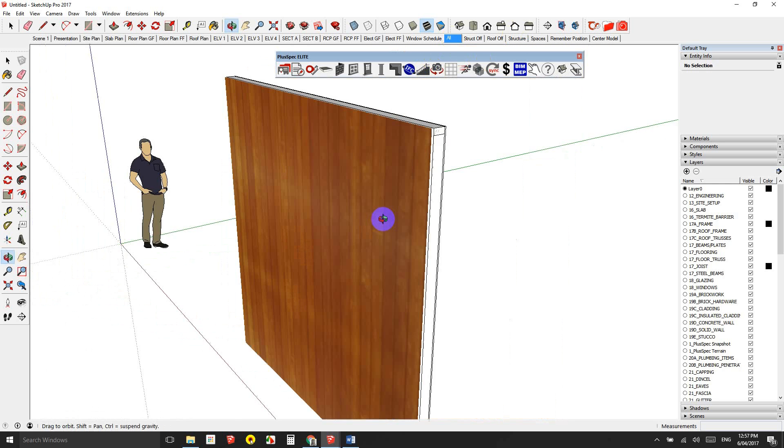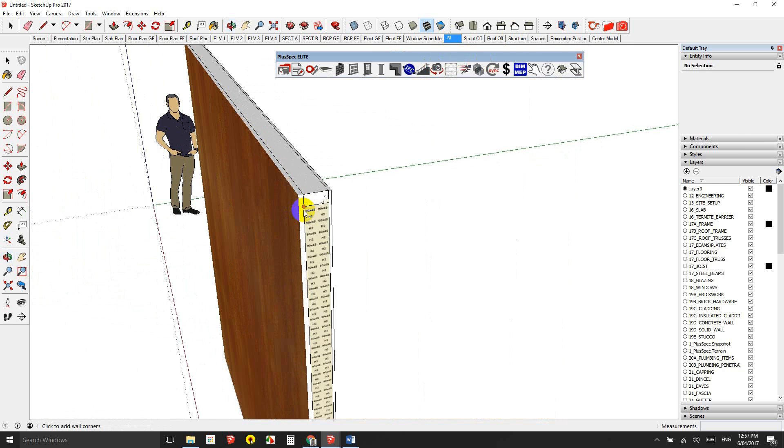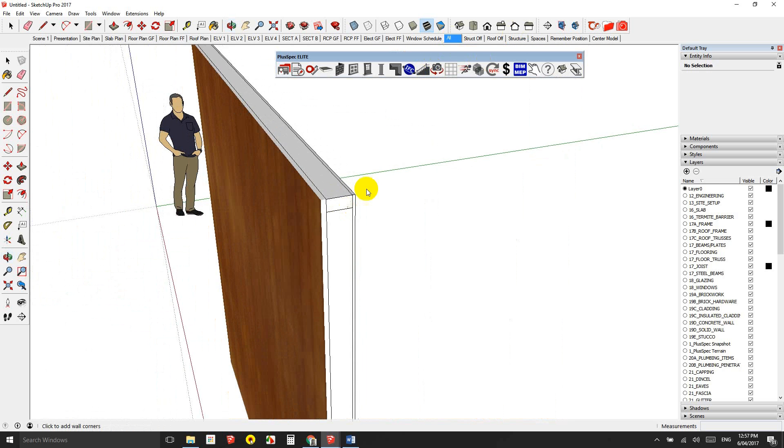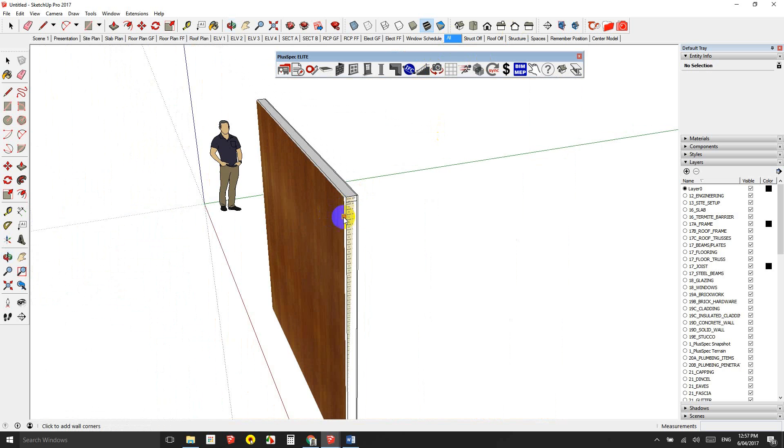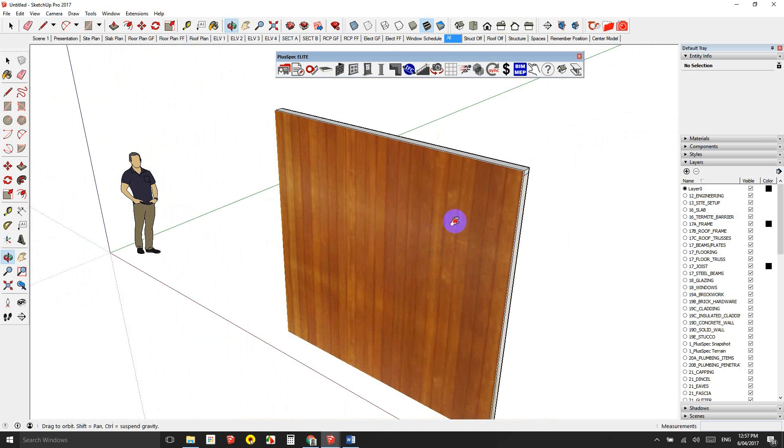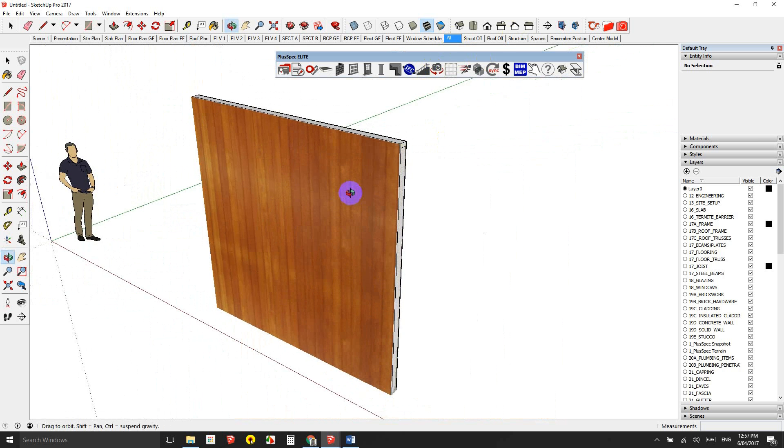The wall has structure and it has everything. And when you look at everything, it has an external lining, an internal lining, a top plate, a bottom plate, and the studs according to the spacing that I specify when I drew the wall.